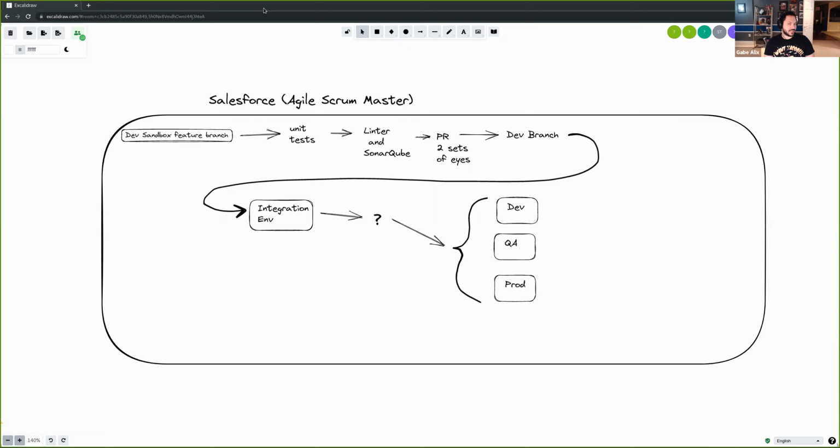That's a danger zone from a development perspective. Let me explain what we do and why we do it. We will cut a feature for our dev team and our QA team. If they find a defect, we actually launch a new story into the following sprint, and that fix will follow into the next sprint.